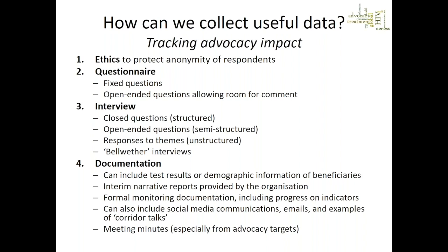And you ask very general questions about certain things, and then if they, without being prompted, say, oh yes, I've heard this organisation's doing this, then that indicates they've heard of the work, even though they're not actually directly linked to it. So as an advocate, that can indicate to you that the advocacy is getting out there to places that you didn't expect. So bellwether interviews can be tricky to set up because they've got to be carefully managed, and you've got to be careful not to preempt, but they can be useful.